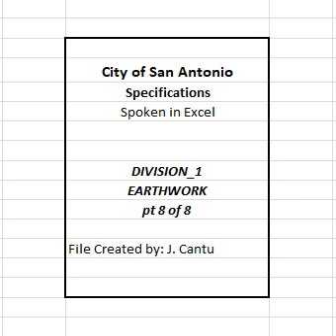Cement slurry will be measured by the ton, dry weight, of the cement used to prepare the slurry at the job site, or from the minimum percent dry solids content of the slurry multiplied by the weight of the slurry in tons delivered. B. Cement treatment. Cement treatment will be measured by the square yard of surface area. The dimensions for determining the surface areas are established by the widths shown on the plans and lengths measured at placement.